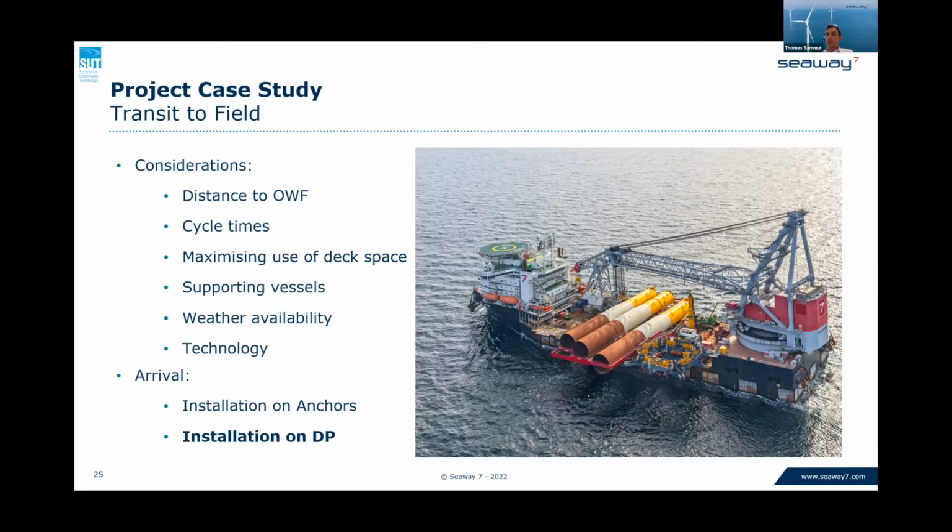So transiting to field, what we think about is the distance. We're looking at the cycle times to go around, pick these foundations up, take them to field, or bring them there to the vessel. We're trying to utilize the amount of deck space we have as much as possible. We're thinking about what vessels to bring along with us, the type of environment we're working in, and obviously the technology we have available to us.